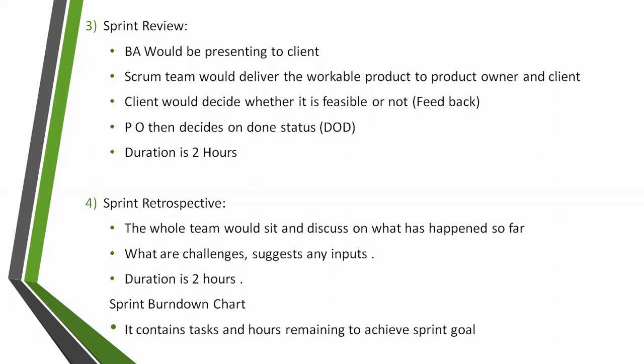Let's assume he's not at all satisfied. Again, we take this as prioritization, and we need to accommodate it in the next sprint based upon the priority. If the client is fine with the work done for the past 10 days and gives positive feedback, then you can move ahead. So this is generally the sprint review meet.